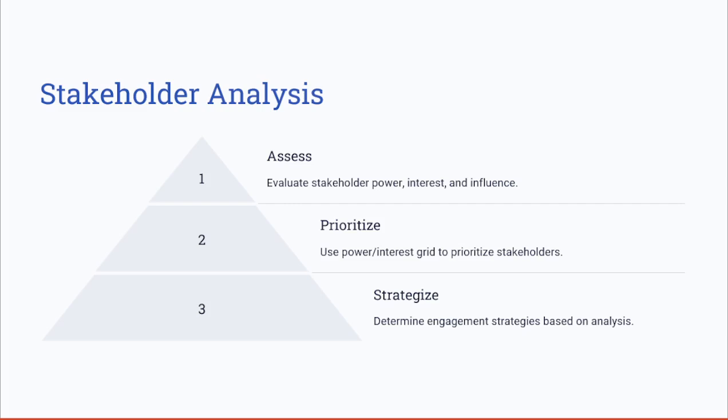The next step, we said, is that we have to analyze these stakeholders, using tools like the Power Interest Grid. In our example, we might have the end users with a high impact and a high interest in the project outcomes, so we have to consider their influence level on the project, which we need to tailor our approaches to, for example, developing a responsive e-commerce platform to meet their needs.